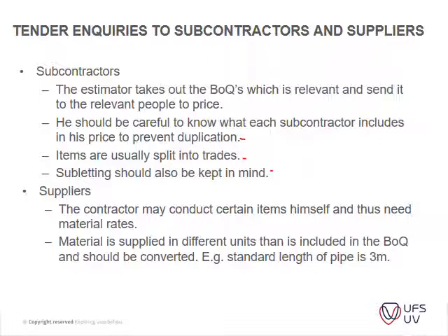Then the suppliers, the same principle applies. He sends out his BOQ for the material rates to suppliers as soon as possible. Then the material is supplied in different units than what is included in the BOQ, so you need to take that into consideration.